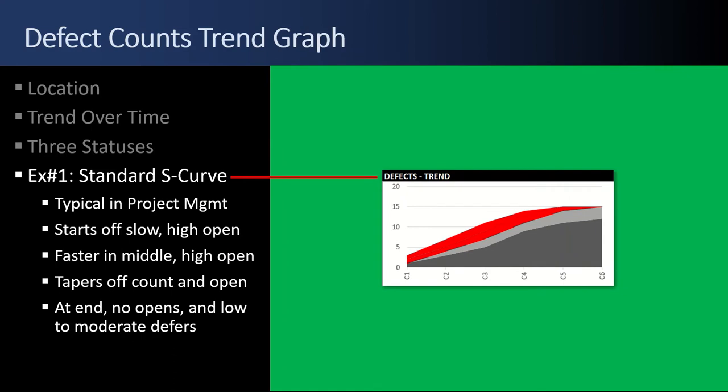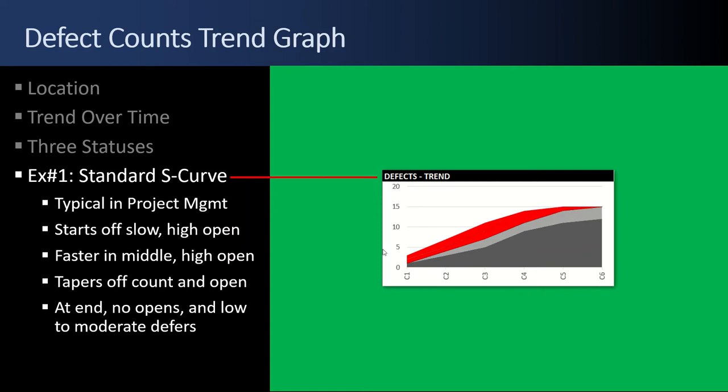Example number one for our defect trend graph, standard S curve, typical for project management. Starts off slow, picks up speed, and then slows back down. Faster in the middle, high opens. There's also high opens in the beginning, but it tapers off as you get to the final cycles. And at the end, there are zero open reds and no low or moderate. Some defers, though. Not a lot of defers, and heavy dark grays. That's great.